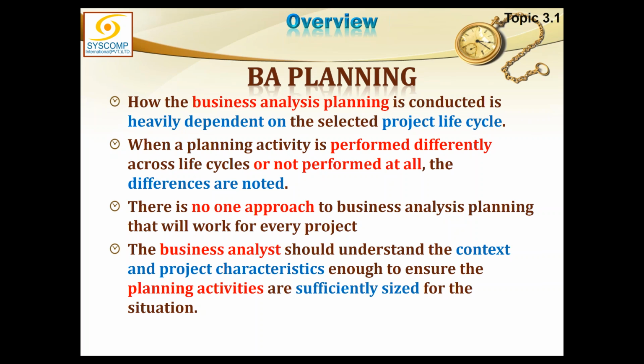So there's a work of masonry. There's a work of carpenter. There's a work of electrician, plumber. These works you are talking about, they all can be done in parallel and they are randomly being selected. You approach it in a way that what is next to be done. Once you have the land ready, what do you do next? I'll start digging the land for the pillars. Yes, you see the demarcation of land, digging of the land, digging of the foundations, preparation, construction, laying of the foundations, and all that.